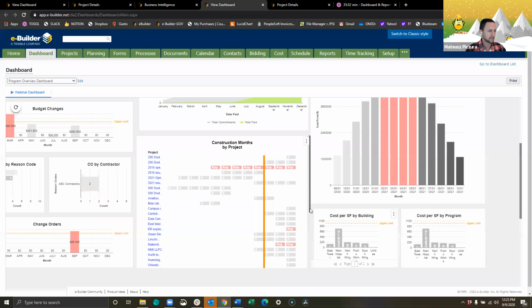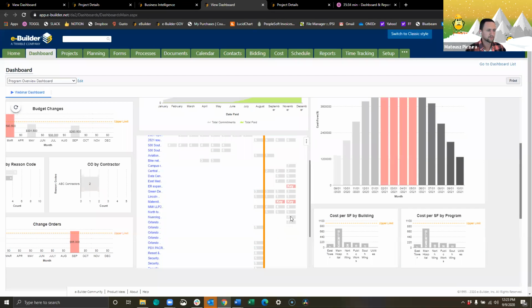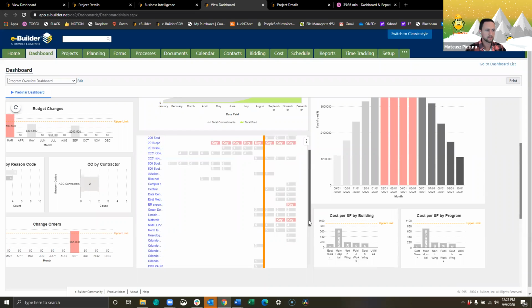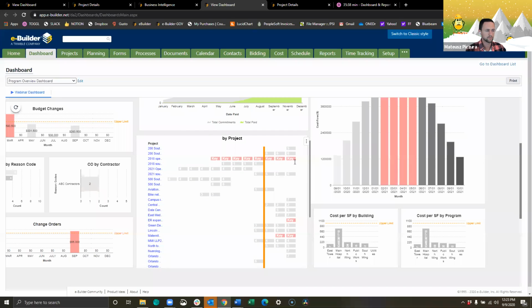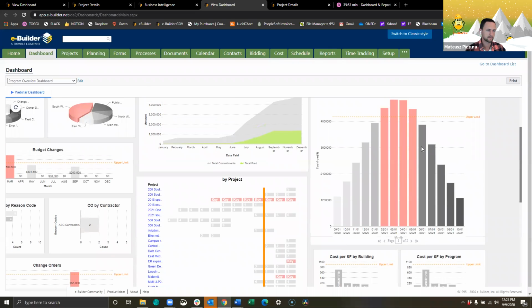And I can, let's say, select the top 5 that I want to focus on and then action that to someone that can actually do some of the investigative work, having those discussions with project managers, coming up with the pros and cons list, and determining what the impact is going to be if you decide to shift those schedules, update those cash flows, and then eventually flatten out that curve to fit your organization's needs.